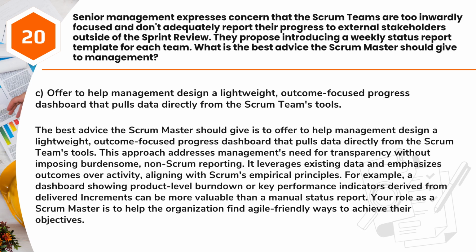Answer: C. Offer to help management design a lightweight, outcome-focused progress dashboard that pulls data directly from the Scrum team's tools. The best advice the Scrum Master should give is to offer to help management design a lightweight, outcome-focused progress dashboard that pulls data directly from the Scrum team's tools. This approach addresses management's need for transparency without imposing burdensome, non-Scrum reporting.